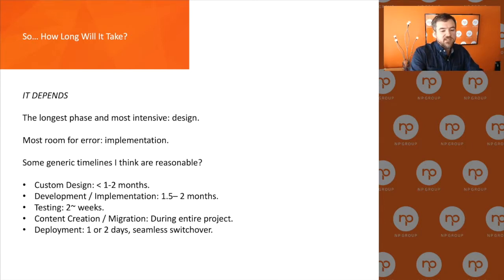So by looking at this, you could see how a project could take anywhere from 3 to 6 months for simple informational, depending upon your organization. So here we are. Let's say it's January, February. You could be looking at Labor Day till your site is done. So these are things that are important to consider.